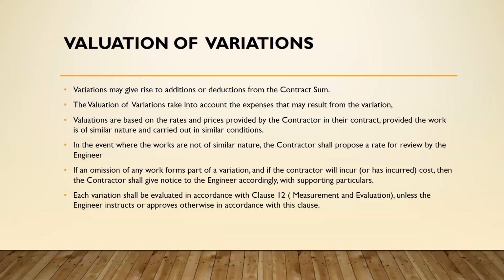The valuation of variations takes into account the expenses that may result from the variation. Valuations are based on the rates and prices provided by the contractor in their contract, provided the work is of similar nature and carried out in similar conditions.